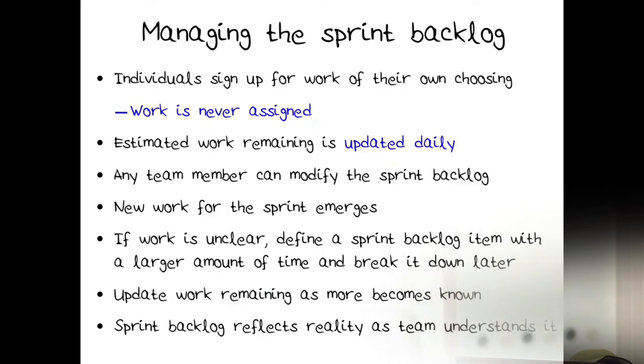And if you remember, these tasks are estimated in hours, right? And you might pick one of these tasks and start to work on it, and say that this task was estimated to take 2 hours. You start to work on this task, you spend 4 hours. And in your estimate, there's still a couple of hours left. Right? It doesn't matter how much time you have spent. The only thing that matters is how much time do you think is left? It doesn't matter how much you put in. It's only about getting to the goal, right? And we'll see how that is important later on.